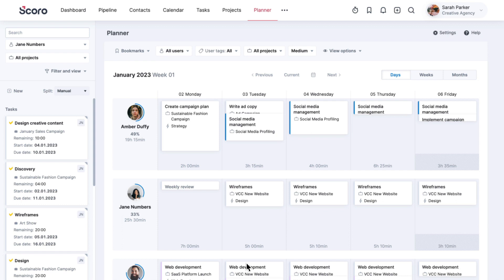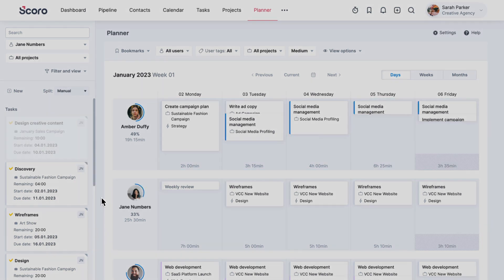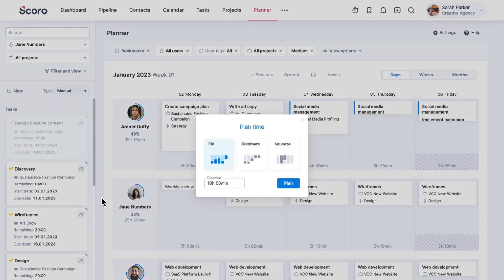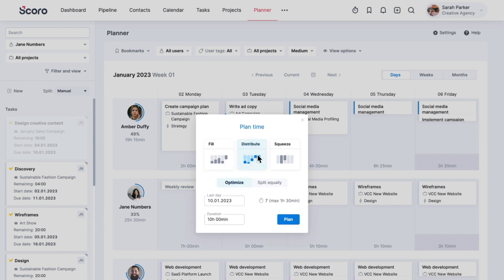Here, you can schedule assignments for specific days. Let's say you've allocated 10 hours of design time for a specific project. You can use the Planner to distribute these working hours to fit the specialist's schedule.